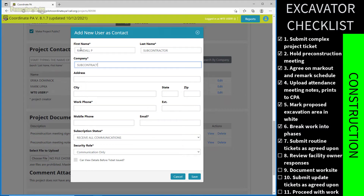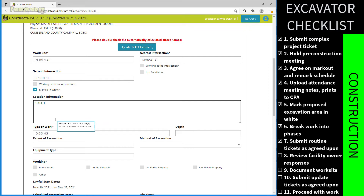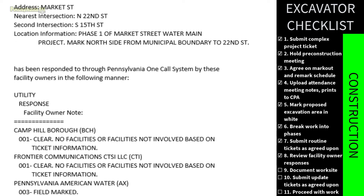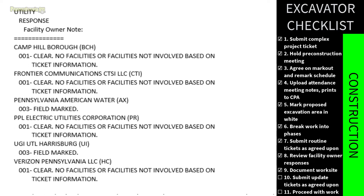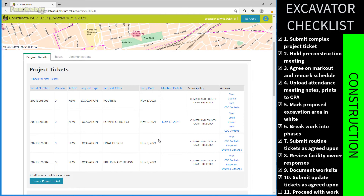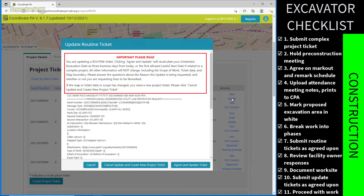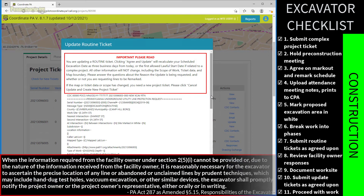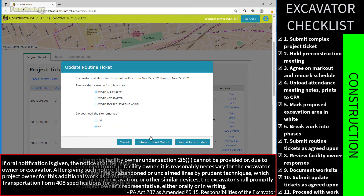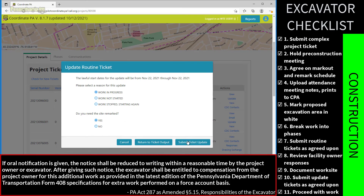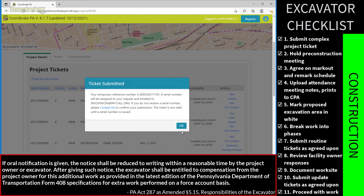Subcontractors cannot dig off the excavator's ticket — they need to place their own. The excavator enters their subcontractor's name and info into CPA so they have permission to enter routine notifications. Once tickets are submitted, all affected facility owners receive them and send locators to the site. Facility owners respond through CARL, and the excavator reviews those responses and documents the work site before beginning excavation. Update tickets are submitted as needed to have sections of the work site remarked.